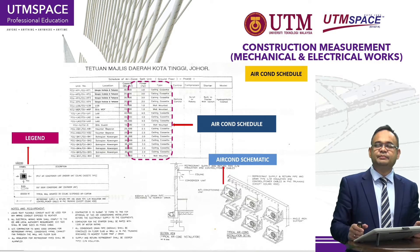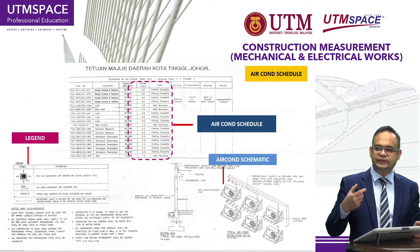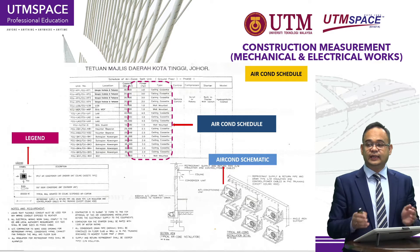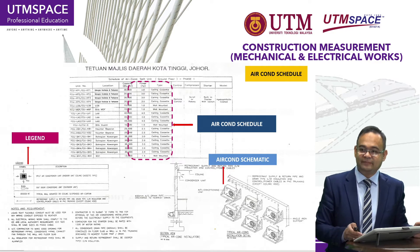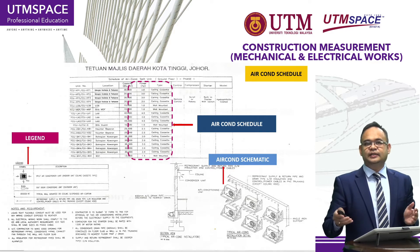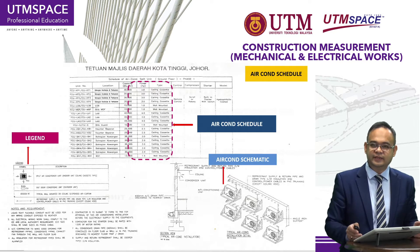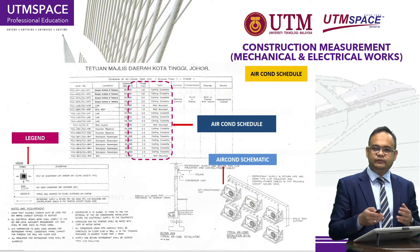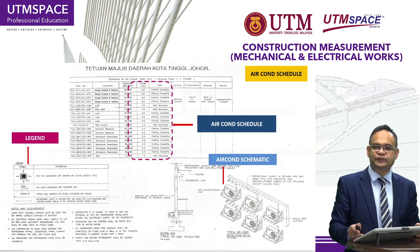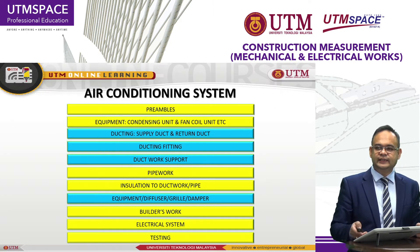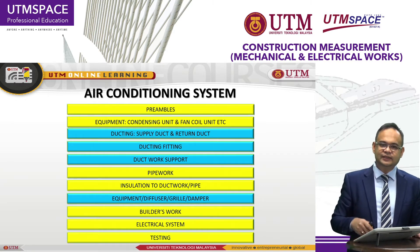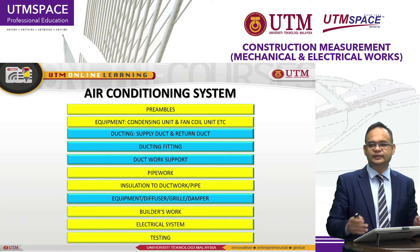The aircon schedule is very important for the engineer to communicate the location of equipment, the cooling capacity, and the type of air conditioning to be installed. The aircon schematic is a technical drawing provided by the engineer to help prepare the bill of quantities for air conditioning installation.